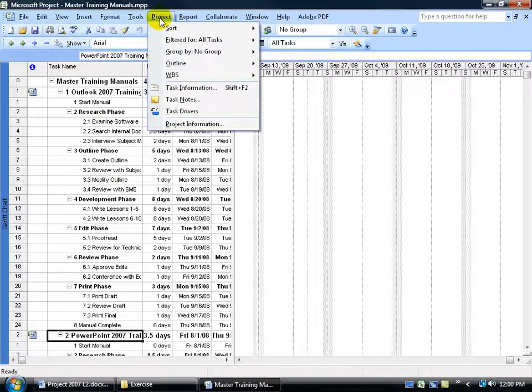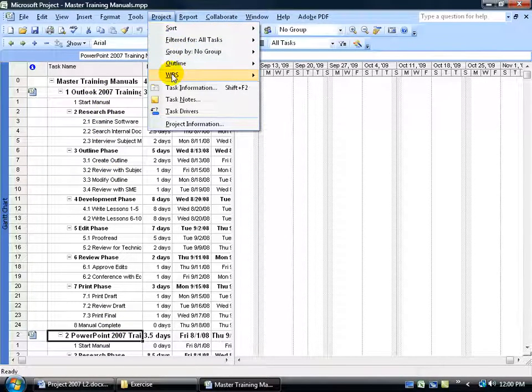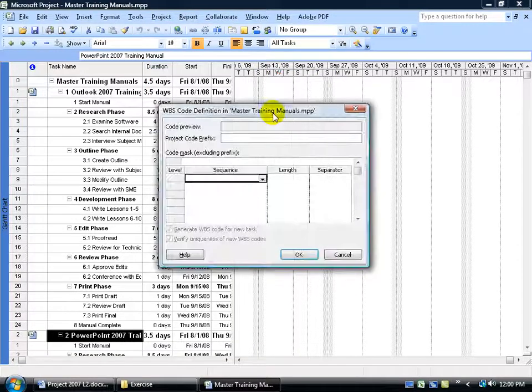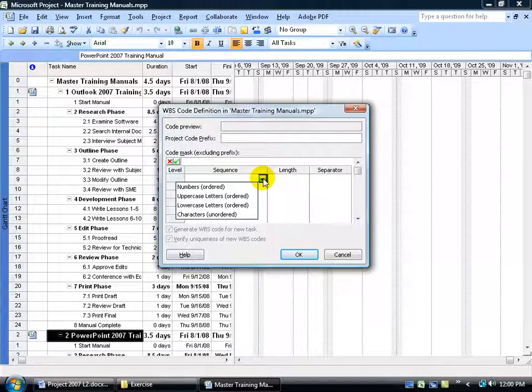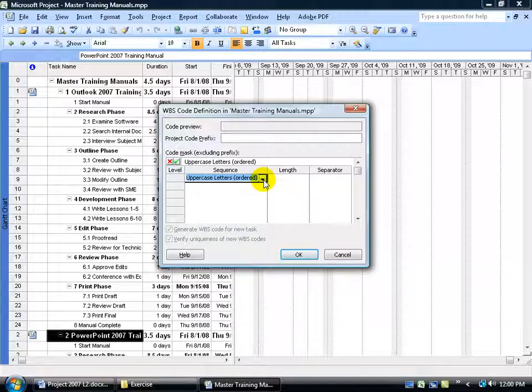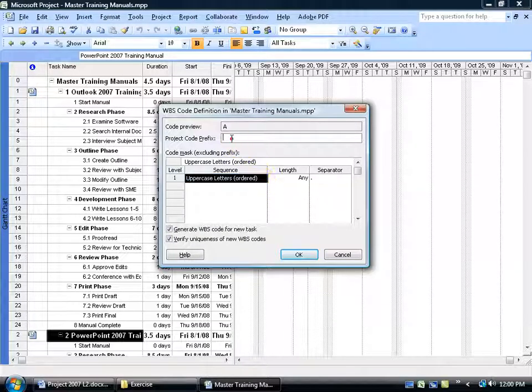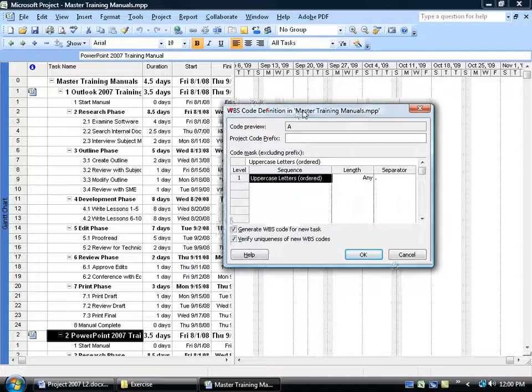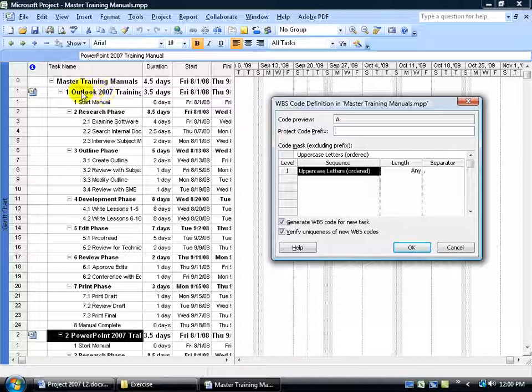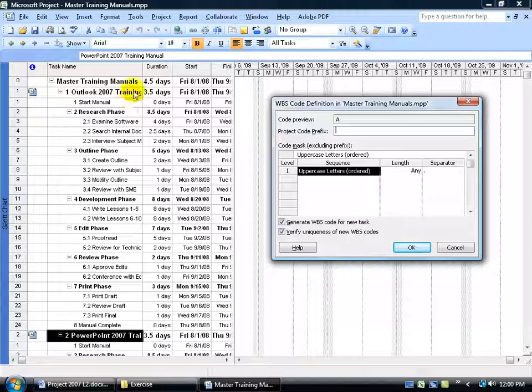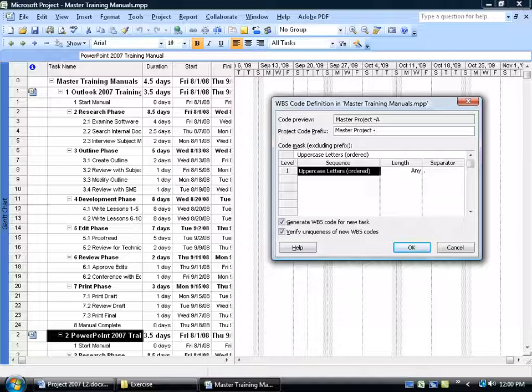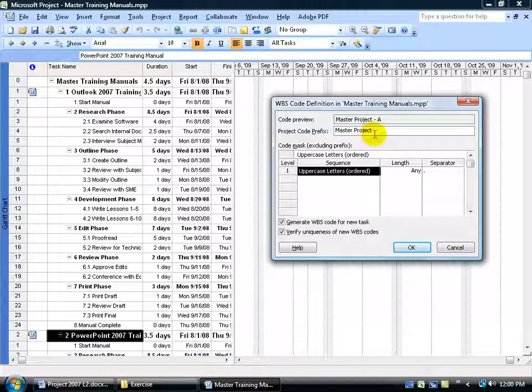Come up here, click on the project menu, go down to WBS, define the code. Click on the drop-down arrow, and this time I'm going to use letters. Again, you can use letters, numbers. There's the code preview. It's going to be a letter. So what that means is that for each subtask here in the master file, and the subtask is of course the separate projects, there's project1, project2, it's going to letter them as projectA and projectB. But let me make sure that I define it as the master. Project, outline, dash, space. And then click OK.